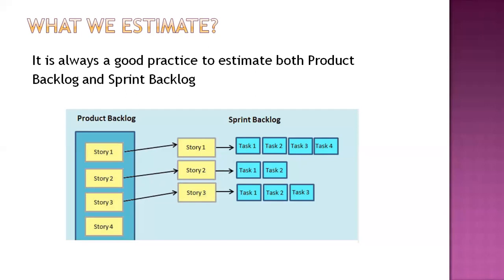It is actually only valid for the particular Scrum time box event, which is called a sprint. If you are using a 10-day sprint or 15-day sprint, which means the length of the sprint is 10 days or 15 days, according to that, your sprint will get closed. It doesn't matter whether you are completing all the work items or not, the sprint will get closed, right? There is no exit criteria of a sprint. There are multiple entry criteria, but there is no exit criteria of a sprint. Even though you complete it or not, it is a time boxed event. So once the clock ticks on the 10th day, if the length of the sprint is 10, that's it. You are done with the sprint and you will be starting a fresh sprint.